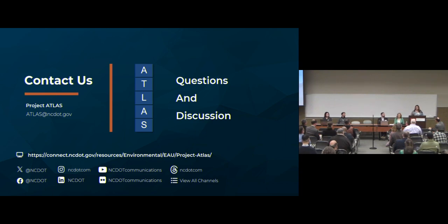If you load it through SharePoint and you never loaded it through Atlas, the only way Atlas will recognize it is if you have the exact naming convention that Atlas gives it. So if you load a file with the old naming convention, Atlas will ask you, hey, this doesn't match the standard. We're going to rename it. Is that okay? You check yes. It renames your file, loads it into SharePoint. And so then your file is going to have the correct name, the correct tags, and the correct placement in the folder structure. Okay. I think so.